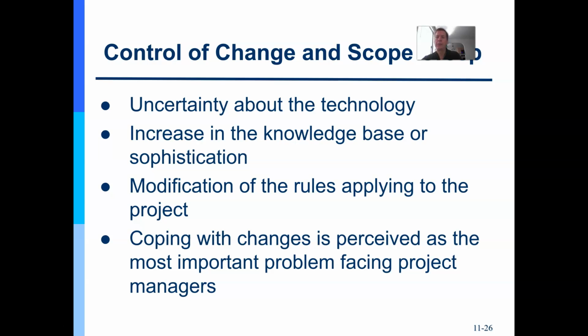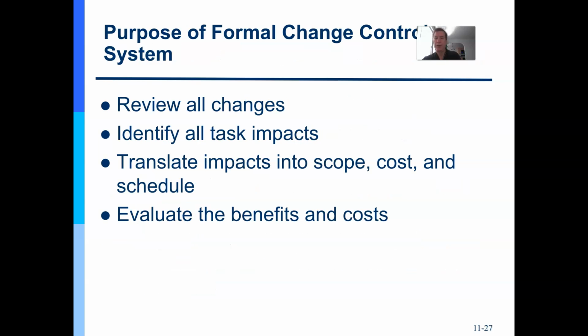But we want to make sure as project manager, protect your triple constraint. Do not allow requirements in that really aren't in accordance with the business documents, which align with the charter, which aligns with the project plan. Protect it at all cost. But if you do have to do a change, like add a requirement, that's a change to scope management. You'd want to go to a change control board. Well, it starts with a change control system. You set up this system for change. And in a change control system, you'd set up a change control board, who are members on the board, who are voting members on the board, which can be different.